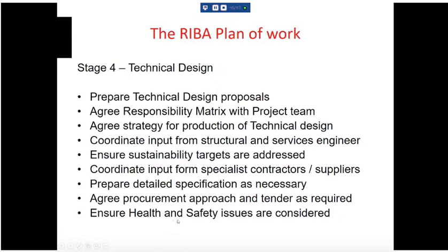You look at your procurement approach, because depending on if you're going traditional, like the Whitworth Art Gallery, or whether you're going design-build, where the contractor is very much in the driving seat, like the university here, will make a difference to how much you involve the supply chain and the contractor in bringing all these details together. Because if the contractor is taking responsibility for everything, they will have a big say on what you specify. You'll have to agree with them. So there's like a three-way thing going on between you, the contractor, and the client. And finally, you've obviously got the health and safety issues to be worrying about.